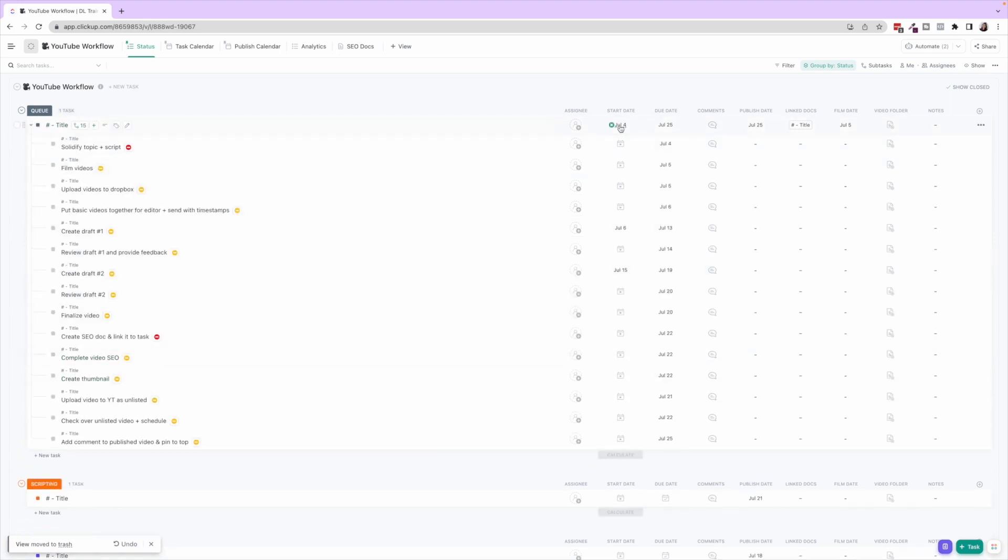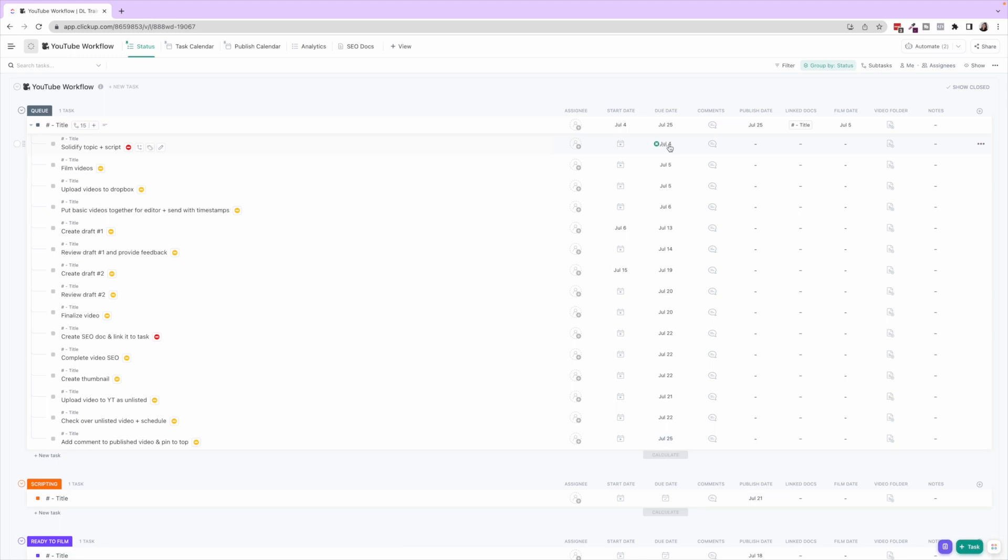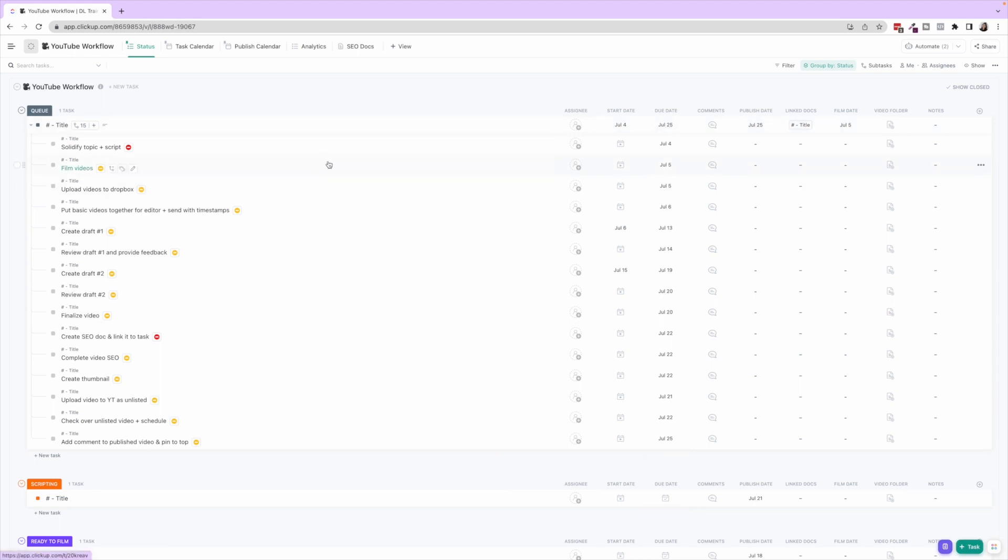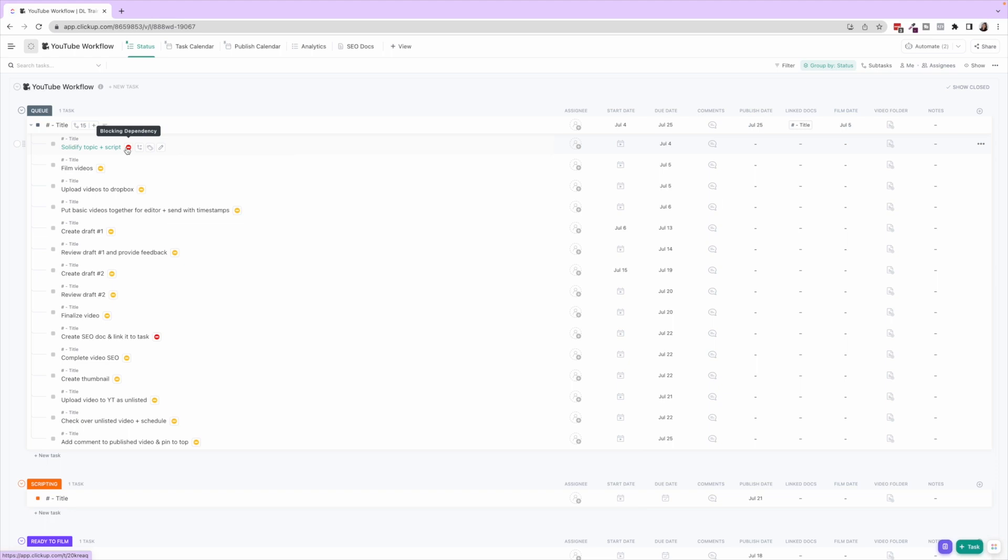We also have mapped out this is about a three-week timeline for creating a video from solidifying the topic and script to actually publishing the video. Your timeline might be different. If you are doing this all on your own, it could be longer, shorter, whatever it may be.